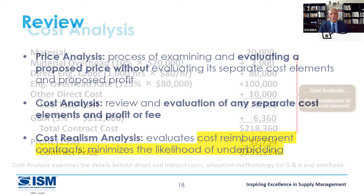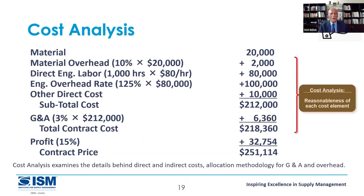A simple example of a realistic cost: material cost $20,000, material overheads 10% ($2,000), direct engineering labor 1,000 hours at $80 per hour, engineering overheads, other direct costs, then general and administration costs at 10% of total cost. We come with a profit margin of 15%, giving a broad total — mostly in Western countries the cost would be around $250,000.